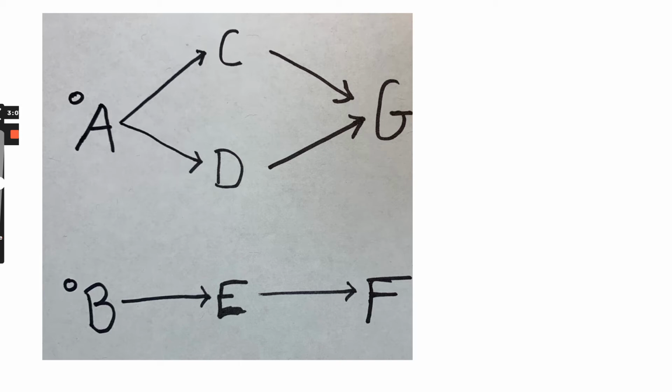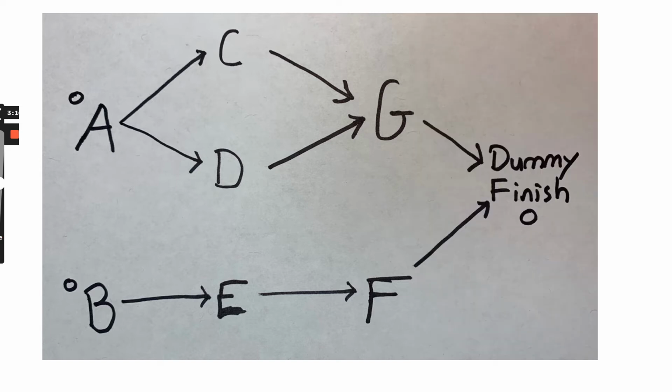If we stopped our mapping at this point, it looks like we have 2 open-ended finishes. So to make it easier for me, I give it a dummy finish here at the end. And that dummy finish, of course, has a 0-day duration. Now I'm ready to start.